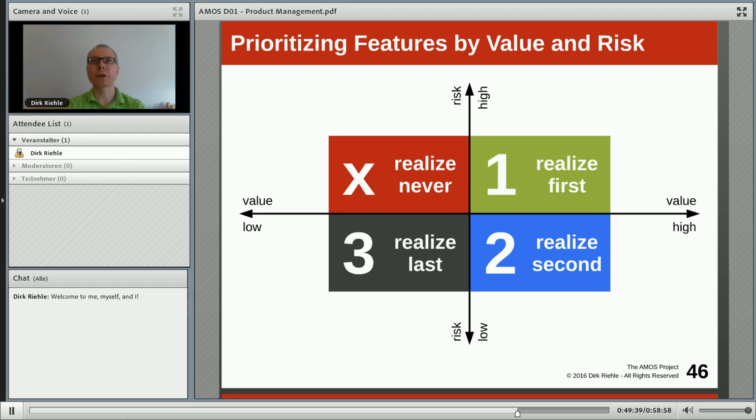No, you do pick up, if you have spare time, if you have not so much time pressure, those with some value, not a lot, and low risk, meaning you know you'll get them done. Just ignore, never do high risk, low value items. So this very basic two-dimensional model is of course very simple, but it is focused on business value as the primary mechanism of choice.